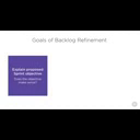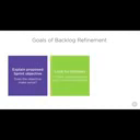As I describe each item, I'd like for you to consider a few questions. First, as we describe each item, please consider any reasons why you wouldn't be able to select that item for the next sprint. Are there technical prerequisites to that item that we haven't tackled yet? Or are there questions about the goal of this item that we still need to answer? Bringing these questions up now will give me the rest of this sprint to find the answers before the next sprint begins. I'd rather have this discussion now instead of on the day of sprint planning.